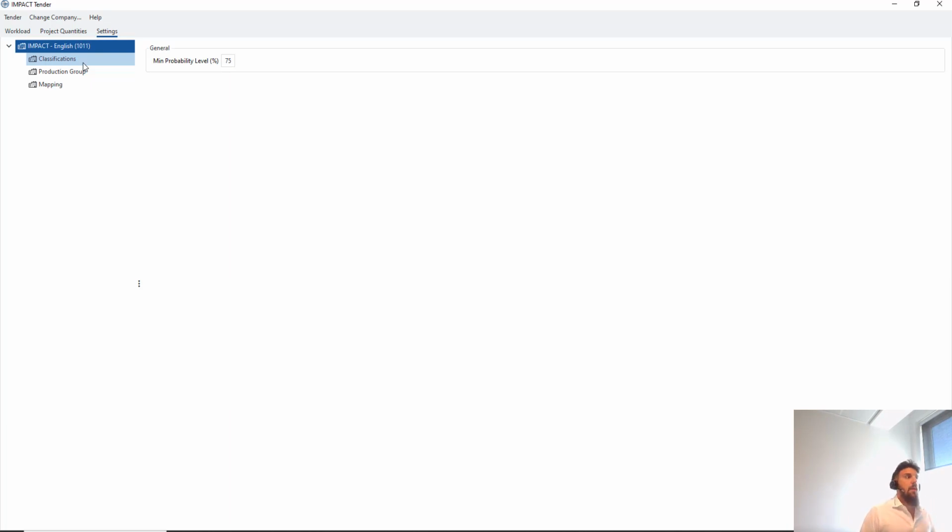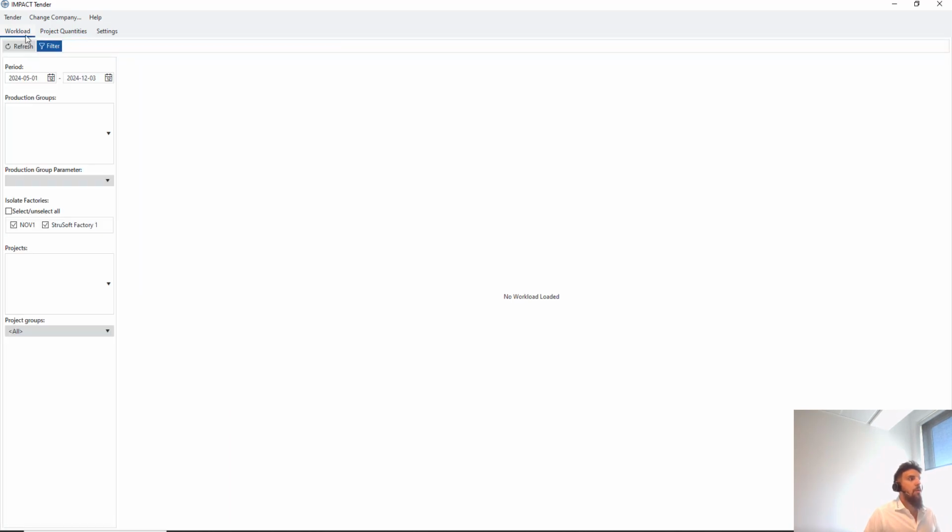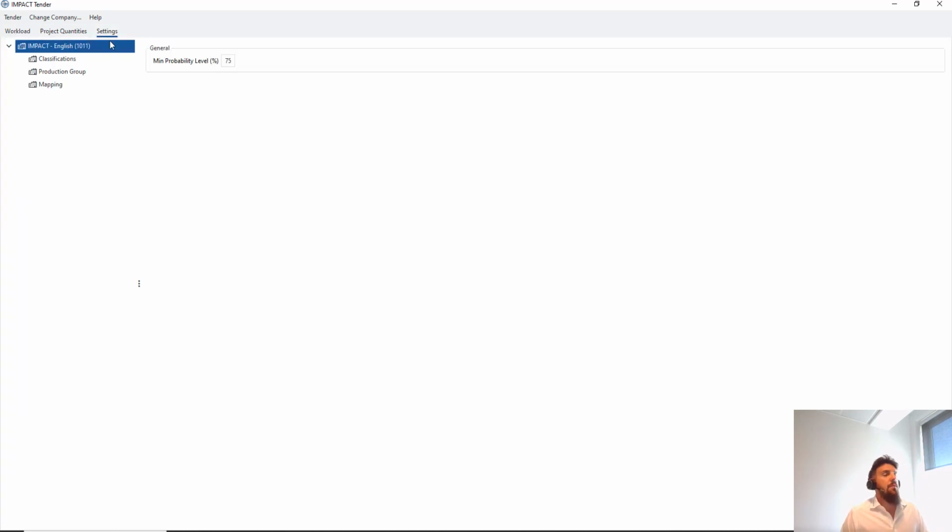First of all, a quick explanation of what we want to do. We want to see a rough workload of the elements that are not in the system. In the previous years, when we wanted to rough plan a lot of elements, you needed to have the whole model ahead of time, and that's of course unrealistic. So here you can put in only quantities of elements, no real precast elements, and that will affect your capacity for the future, your tender capacity.